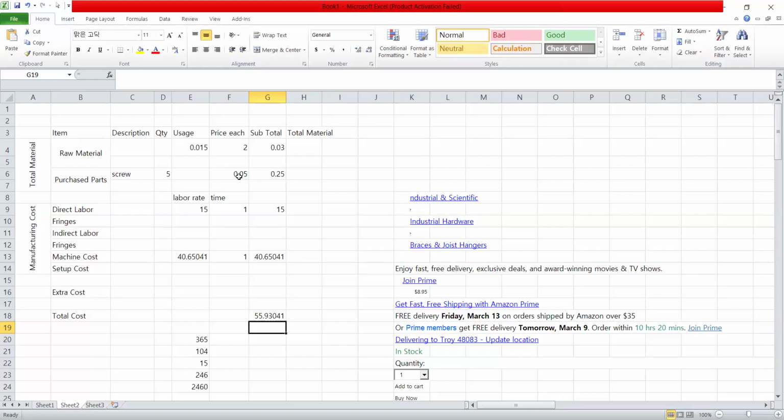Maybe in actual it is 4 cents, but when you put 5 cents, you have to document your assumption, because during the negotiation they ask, how did you estimate 5 cents? So you will say, I went to this website and there the bulk price is this much, or it is in our database and purchasing got this number based on certain volume.